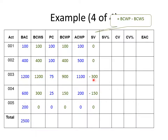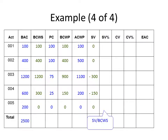For activity three, the schedule variance is reported as minus $300,000 — a negative figure meaning we are running behind schedule. Activity four is also behind schedule. Most software tools like Microsoft Project report this as a percentage, using the formula: schedule variance divided by budgeted cost of work schedule. Activity three is 25% behind schedule and activity four is 50% behind schedule, so as a project manager you must note these activities are performing poorly in terms of time.